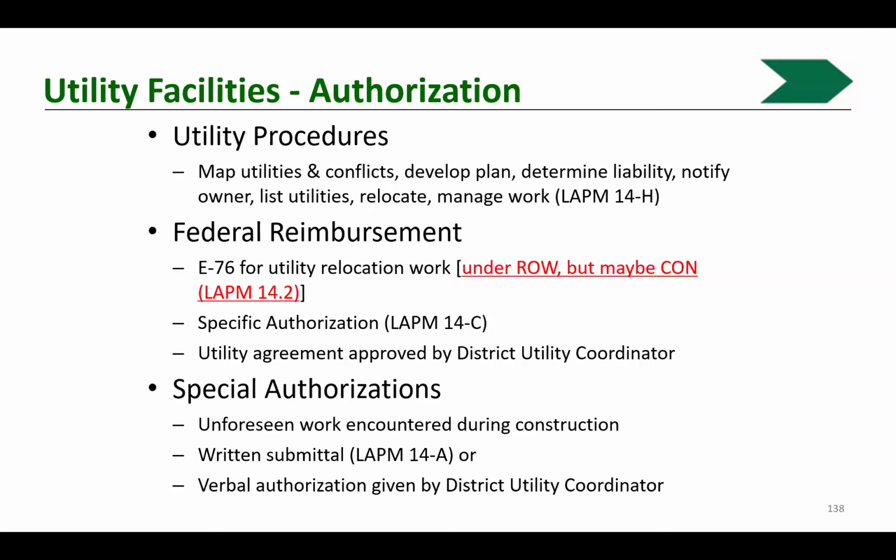Peter, I think the next question has to do with a clarification of the state highway system and the federal aid system. Yeah. In the case of right-of-way, any right-of-way work that you need to do that's outside the local agency's current right-of-way needs to be covered by this right-of-way work that we're doing here, whether it's a minor collector, which is not on the federal aid system, or a major collector, which is on the federal aid system. That part doesn't matter for following the right-of-way rules.